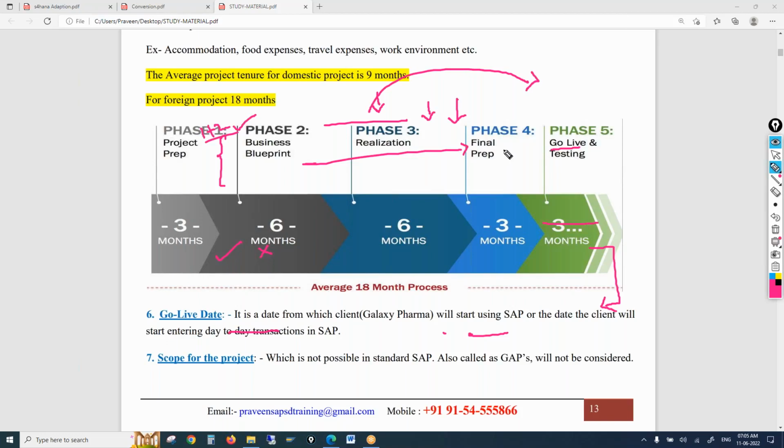That means we have to wait the whole tenure to see a live project. But using this particular agile, you'll take the project in sprints and you can have multiple go lives, so that you don't keep the customer waiting for the entire tenure. You first go live with whatever is there in the basics and you can start adding the features and functionalities. Customer can start using the system as well.